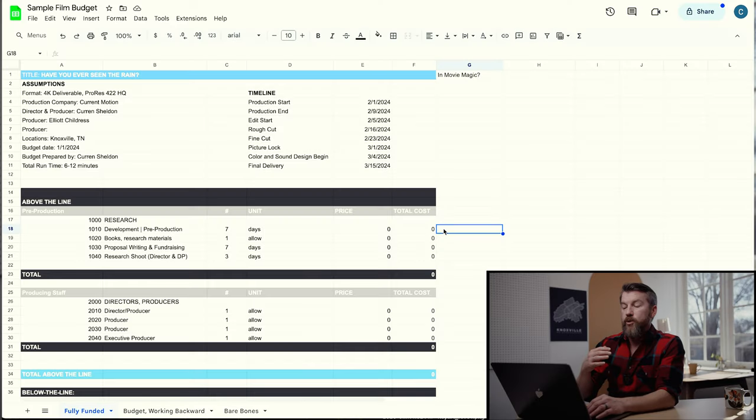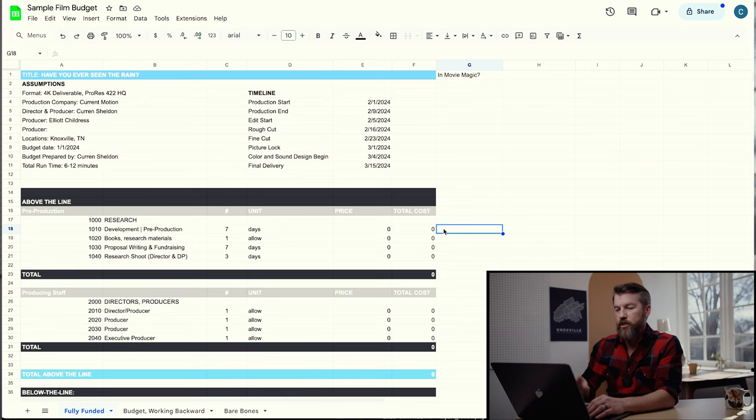There are two main segments of a budget: above the line and below the line. Above the line covers all the people involved from start to finish — pre-production, production, post-production, and delivery — usually the director and producer. You also add in pre-production materials like writers for narrative scripts, research, development, scripts, and research shoots. Those all go in this first section.